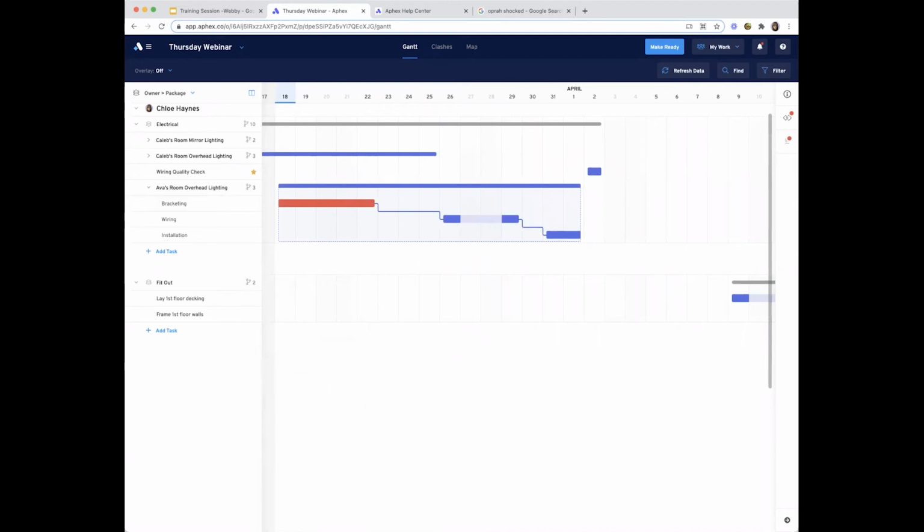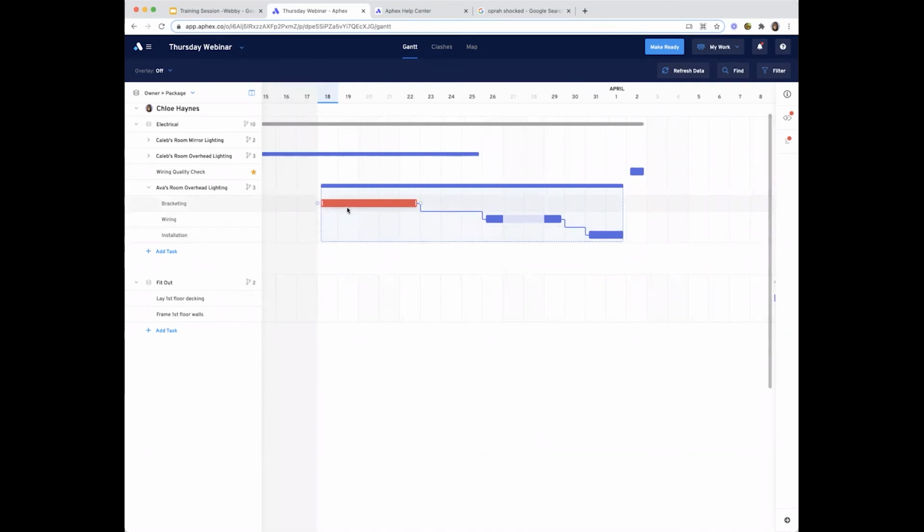Awesome. Okay, cool. So even though we're planning hypothetically today, it would be too far removed from reality if everything was instantly ready to go once we'd filled in all those details. So we're going to have a quick look at clashes. To recap, a clash is when 2 activities are scheduled at the same time in the same place. This might create a space that's unsafe. It might create a working environment that's inefficient, dangerous, or simply not feasible. You'll notice when I assigned my location and work area to this task here, it went this bright red color. This is what indicates the clash.